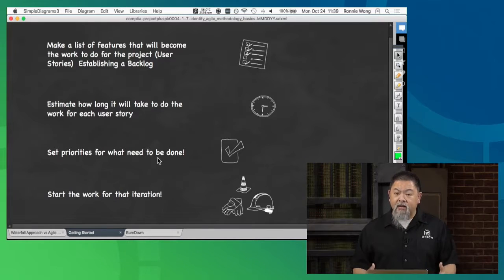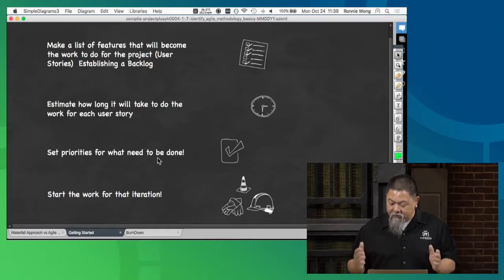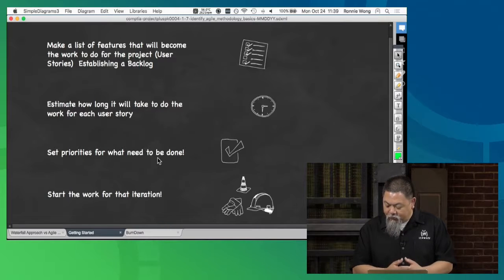And then ultimately, the overall goal is, this is something that's actually kind of neat. You as the project manager are not there just trying to say, here's what you better do. Because of the way that everything came together and it's a self-organized type of team, the working team is the one that tells you how much can be done in that time period. You don't get to tell them. I know this is kind of strange. Project managers love to say, here's how much work has to be done in this time. But the way that Scrum works is, here's how much we can realistically accomplish in the time that we're actually given.